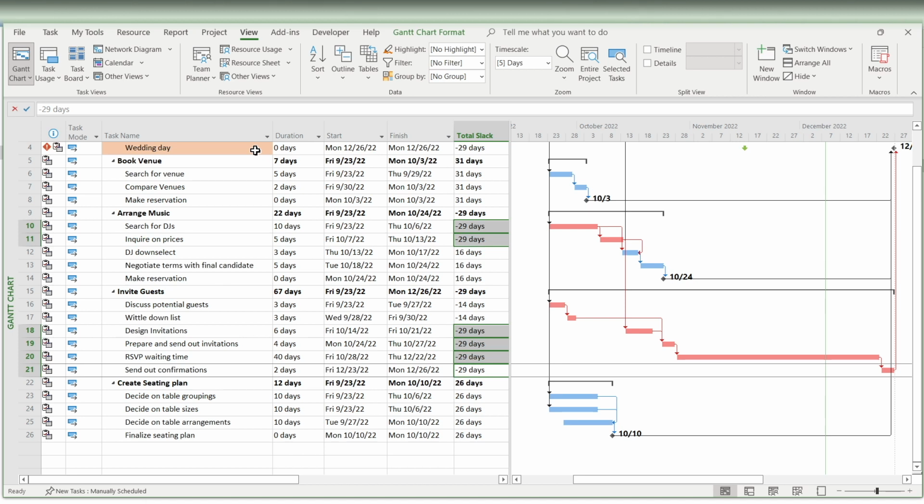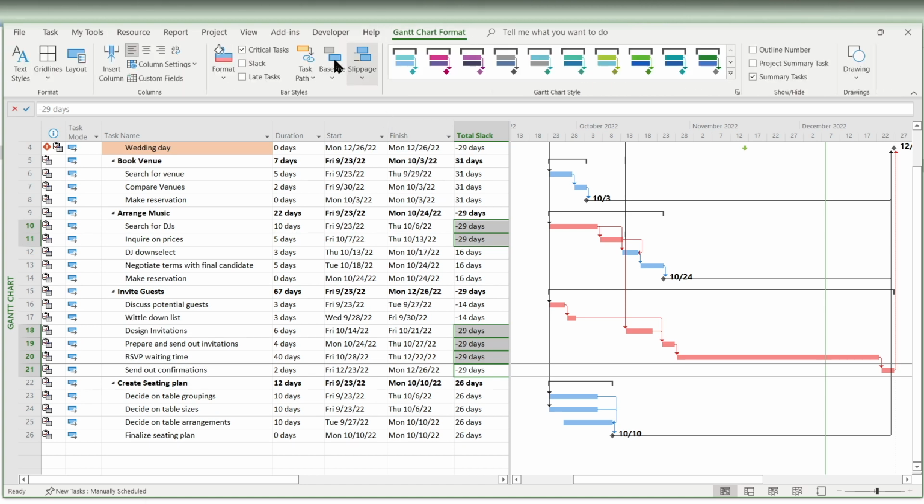The critical path is now the series of tasks with the lowest slack, as we know. So it's these 1, 2, 3, 4, 5, 6 tasks. This is where the complexity comes in. No longer is it just a nice bucketed series of tasks within a section of the IMS, but is now split across sections. You can see in the Gantt chart that it's highlighted red to indicate our critical path.